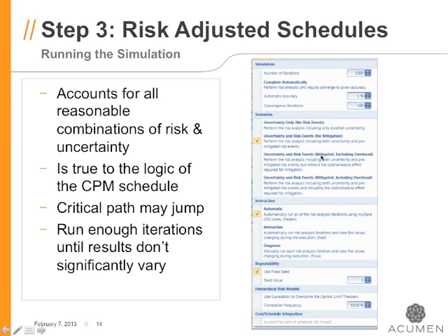Or maybe we do want to take into account the positive impact of mitigation, but exclude the cost of mitigation, because mitigation doesn't come for free. And so the model is even clever enough to say, well, I can differentiate between the benefit of mitigation, but I'm going to offset that benefit with the disbenefit of the time and money and effort it's going to take to do that mitigation.